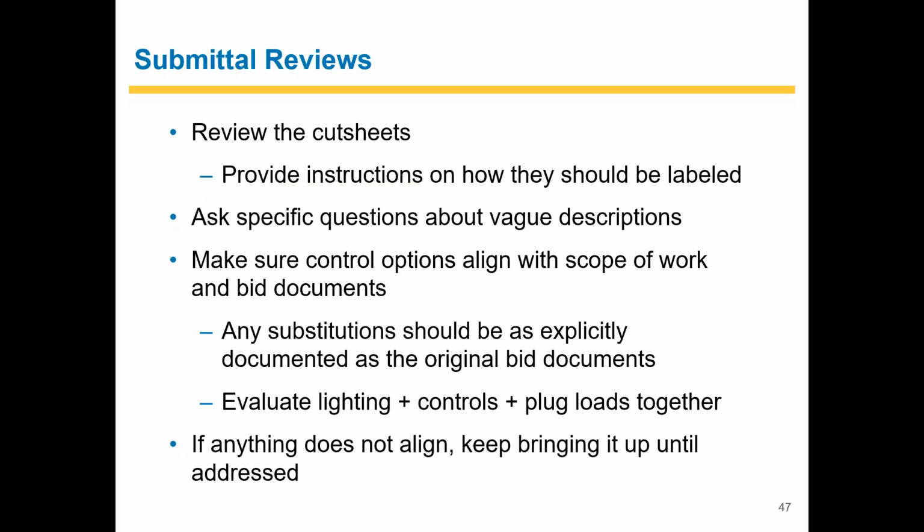On a similar note, make sure to evaluate the lighting controls, the lighting fixtures, and the plug load controls all together, because generally speaking, there's a lot of overlap there. I've had some customers who get an or-equal on the lighting controls, but they don't consider the impact that control change is going to have on their light fixtures and then on their plug load controls. So just make sure that everything aligns when you're doing those submittal reviews.